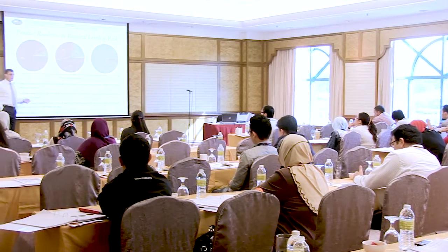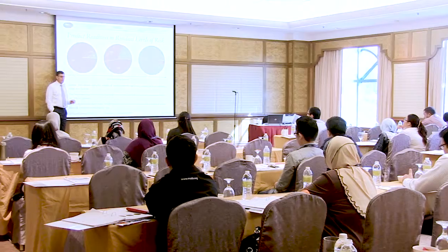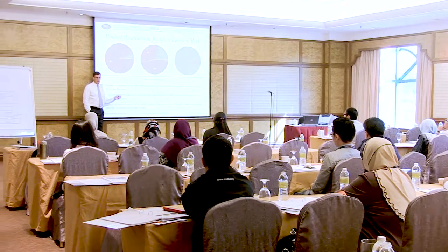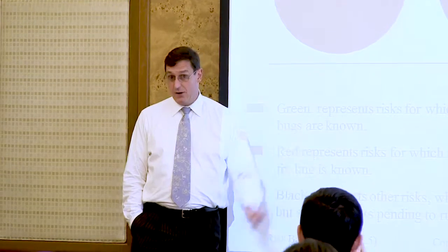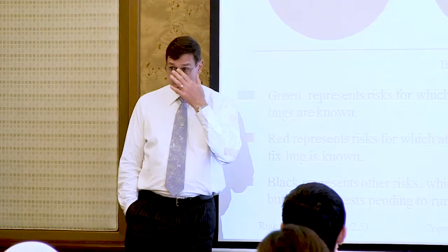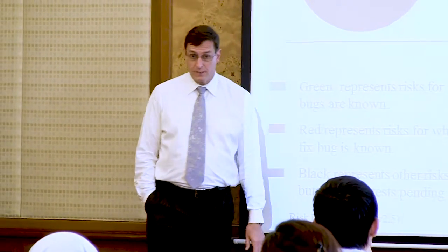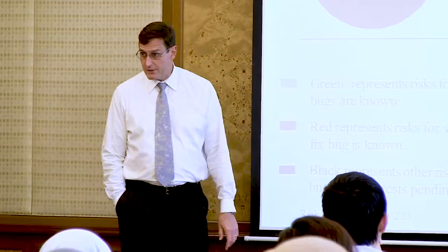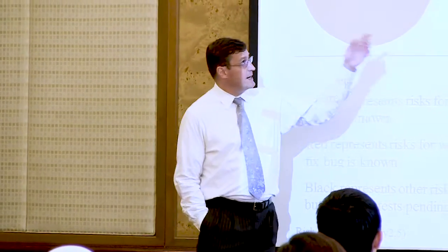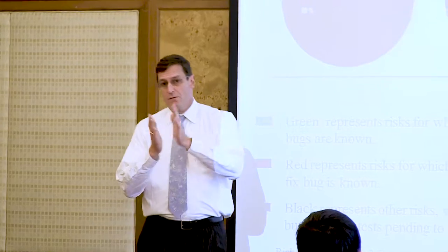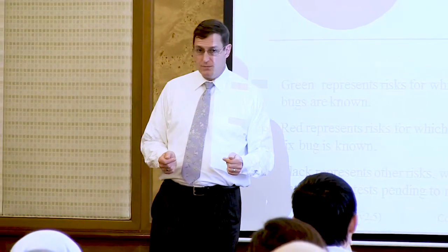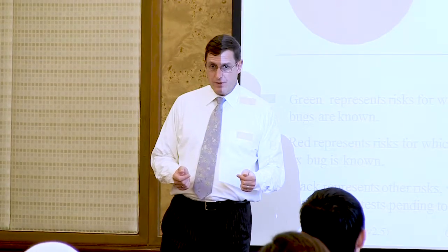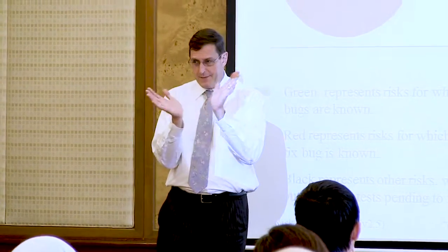Now, you start to run your tests, assuming that you're doing risk-based testing, we're going to run the tests that are more likely to fail first, right? Yeah, the likelihood is part of the risk calculation. Which means that your red wedge is going to grow faster than your green wedge at first. It should. You're running the tests in risk order. Red wedge starts to drive out the black wedge.